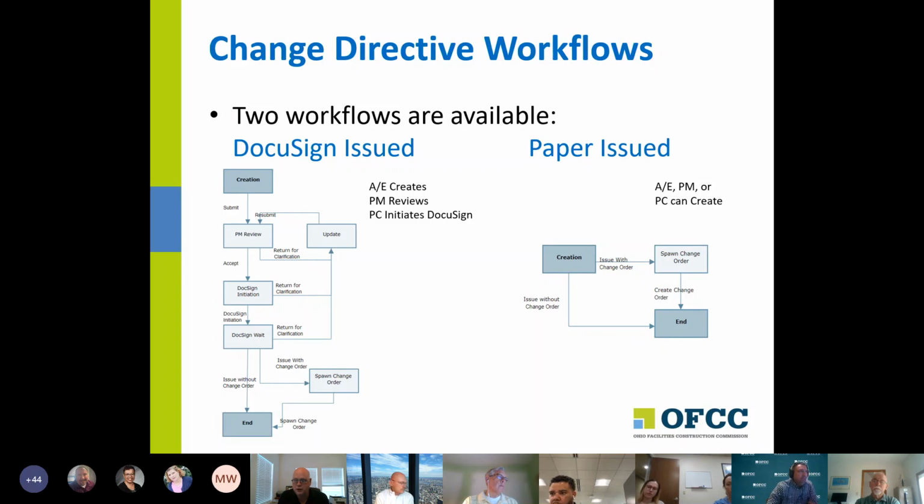Yes. Steve, I'm not sure how that would work in OCI, whether it would be a new change directive record, or if at that point you can return it for clarification where it gets upgraded to a higher level. So it would be a new change directive record because change directives are designed to get to closure pretty quickly. You're going to be at the end step once it's been signed and issued. But you can always put in a new record and reference the original, and work from there.